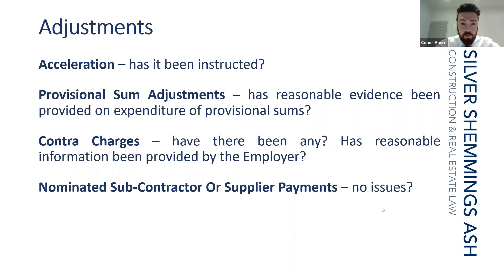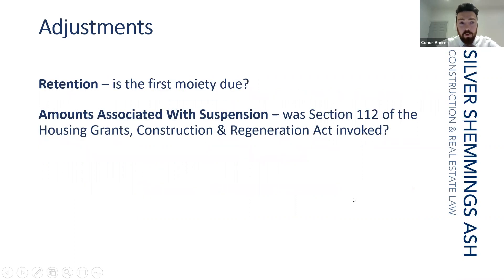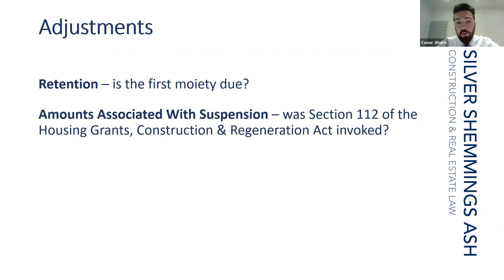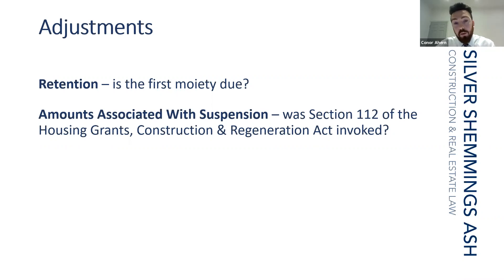Retention: PC should trigger the first release of retention. The contractor will want to apply for that — if retention is 5% on the project, reduce it back to 2.5%, with that final 2.5% being released under the terms of the contract, generally upon the end of the defects period, though it does change regularly so do watch out for that.